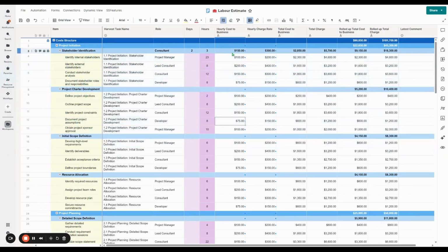They'd work out what type of person would be needing to do the work and how many hours it's going to take them. And then from there, their cost estimation spreadsheet would often bring in what that person costs, what a project manager costs per hour, and what they're going to be charged out at. And then by doing that for the whole work breakdown structure, you ended up with a total cost and then a price to actually propose to a customer. Now, that would be usually used alongside a register or an estimate of what the materials costs would be, flights, accommodation, software, that kind of thing.